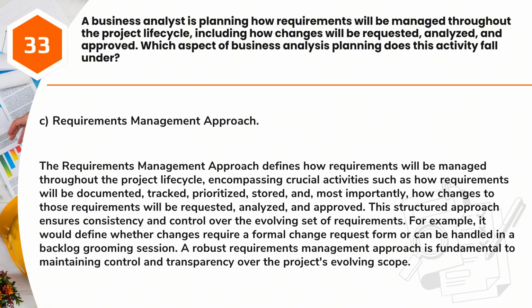Answer: C. Requirements management approach. The requirements management approach defines how requirements will be managed throughout the project lifecycle, encompassing crucial activities such as how requirements will be documented, tracked, prioritized, stored, and, most importantly, how changes to those requirements will be requested, analyzed, and approved. This structured approach ensures consistency and control over the evolving set of requirements. For example, it would define whether changes require a formal change request form or can be handled in a backlog grooming session. A robust requirements management approach is fundamental to maintaining control and transparency over the project's evolving scope.